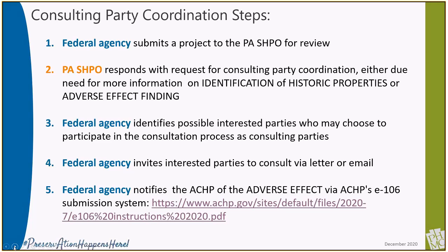We have another one here from Matt, who asked, must the consultation invite be mailed out registered or return receipt? That is a good question, because neither of those things apply. All you need to do is send an email and copy the State Historic Preservation Office or me on that email to document that you are reaching out and this is the method you are using. Because email is so much faster and more efficient, I would say every adverse effect consultation process I have participated in, all the invitations have gone out via email. So no need to be sending registered letters to anyone.